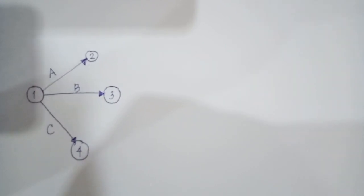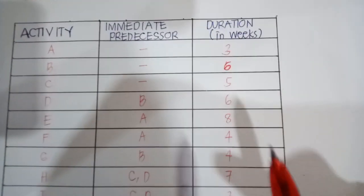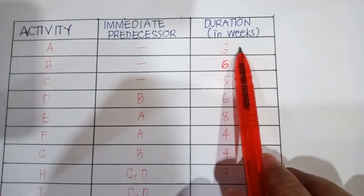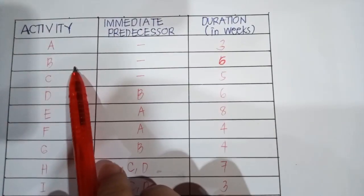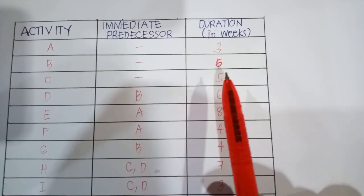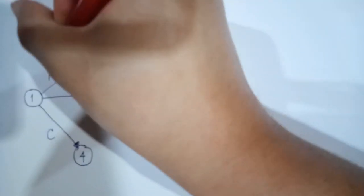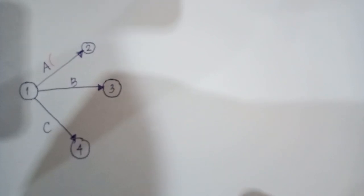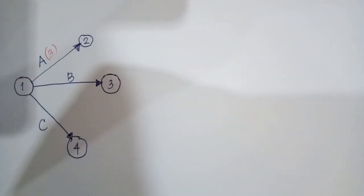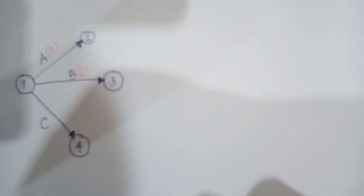Going back to our tabulation: activity A has a duration of 3 weeks, activity B has a duration of 6 weeks, and activity C has a duration of 5 weeks. So on our network diagram, activity A is labeled 3 weeks, activity B is labeled 6 weeks, and activity C is labeled 5 weeks.